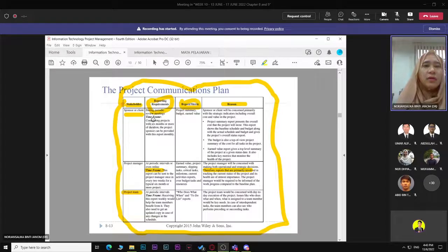Okay, so you need to have, during periodic review meetings, a reporting requirement, this is the time frame. Reporting requirement talks about when. If you think of the sponsor itself, maybe once a month, during the first milestone. But for the project team, maybe you need to talk to them, the progress reporting maybe once a week. But informal chit-chat and so on, without any proper documentation, maybe you have to do it every day. But the formal one will be maybe once a week.